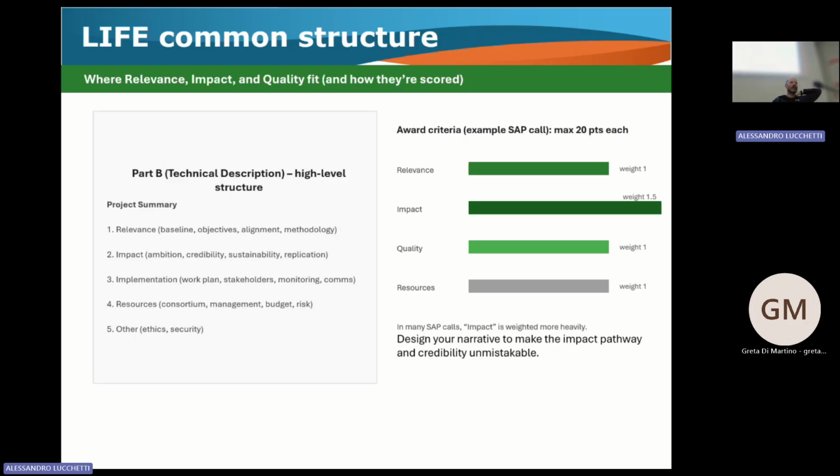Then there is a part on the budget, consortium, etc., which is really time consuming because if you are the coordinator, you have to agree the budget partner by partner according to the activity that this specific partner should do. And that's a political talk with some partners. And then there are all the other sections about the ethics and gender balance.